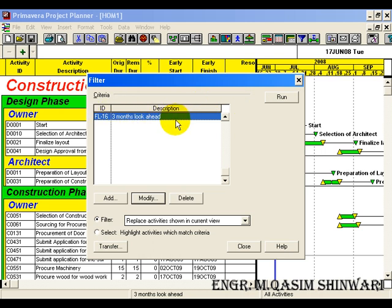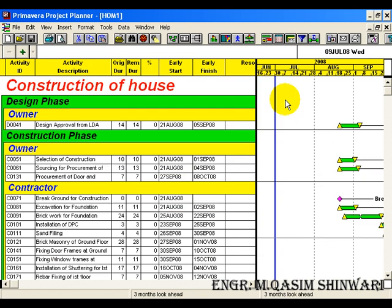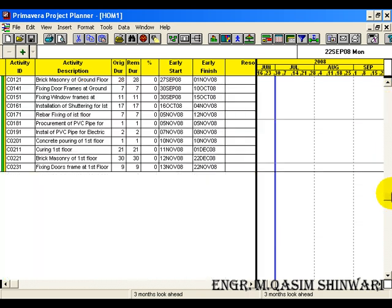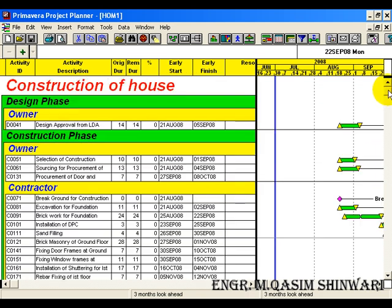Highlight 'Three Months Look Ahead' and click on Run. You can see that we have the activities which will start in the next three months only, and these are also sorted and grouped.